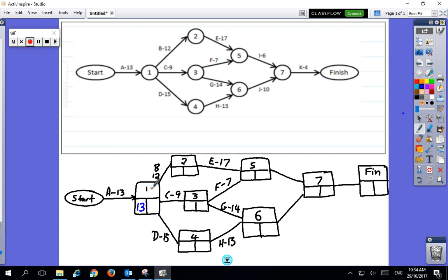So here's stage 1, and this is what I want to explain: the numbers up here to me are like stages, whereas these individual little lines are activities that help us get to the next stage. So in order to get to stage 2, I'd have to do just this one activity of 12 hours. So there's no way around it. That'd have to be 25.